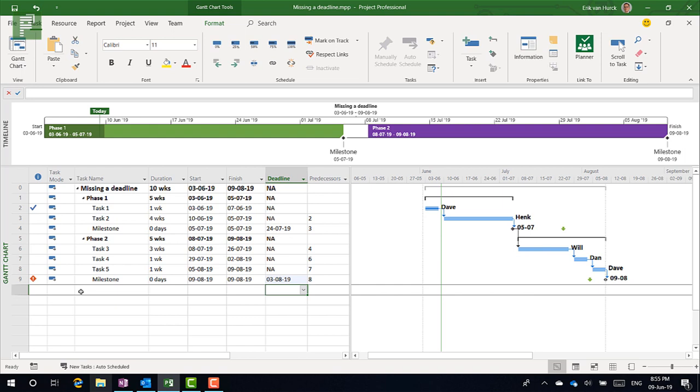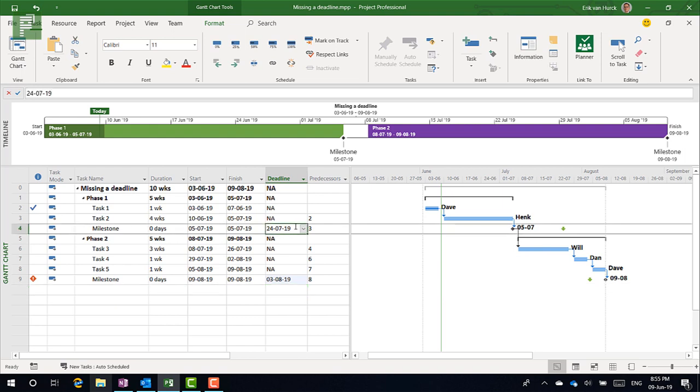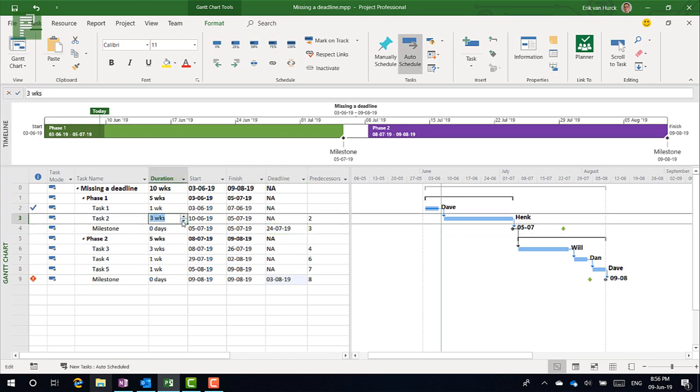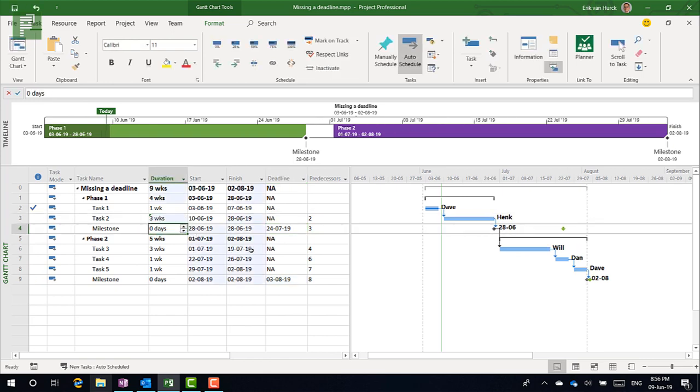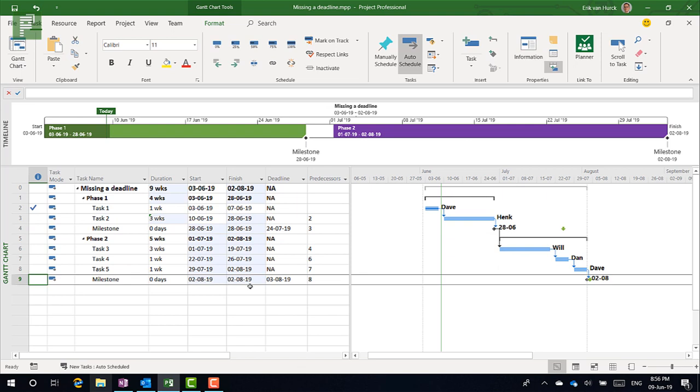So it is best practice to have at least one deadline in that schedule, and maybe for very important moments in time you can set a deadline as well. So once you have that deadline in there, you'll have a clear point in time that you're going to focus on. So remember, a milestone is dynamic - it moves together with all the other elements within the schedule, such as this one. Just have this one move a week earlier, and what we immediately see happening is that the whole schedule moves to a date earlier than previously. And now we're actually ahead of our deadline and we're doing quite right.